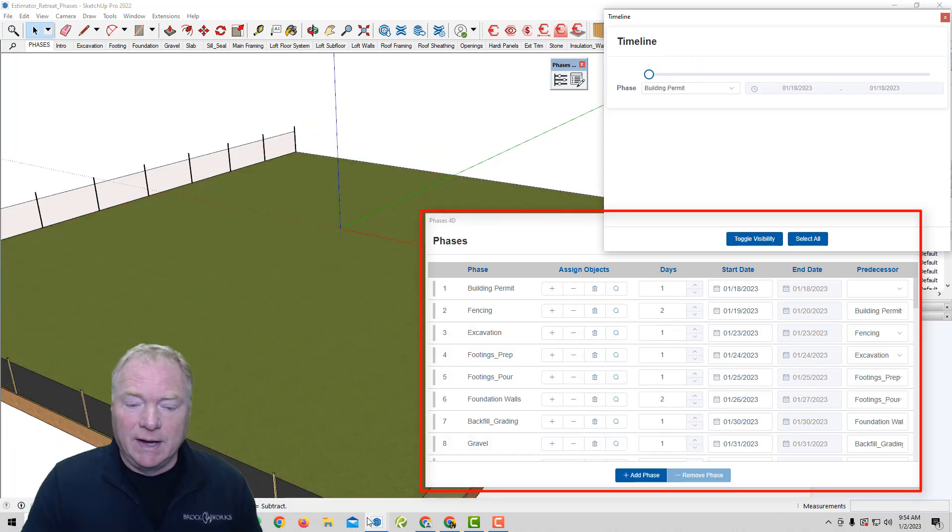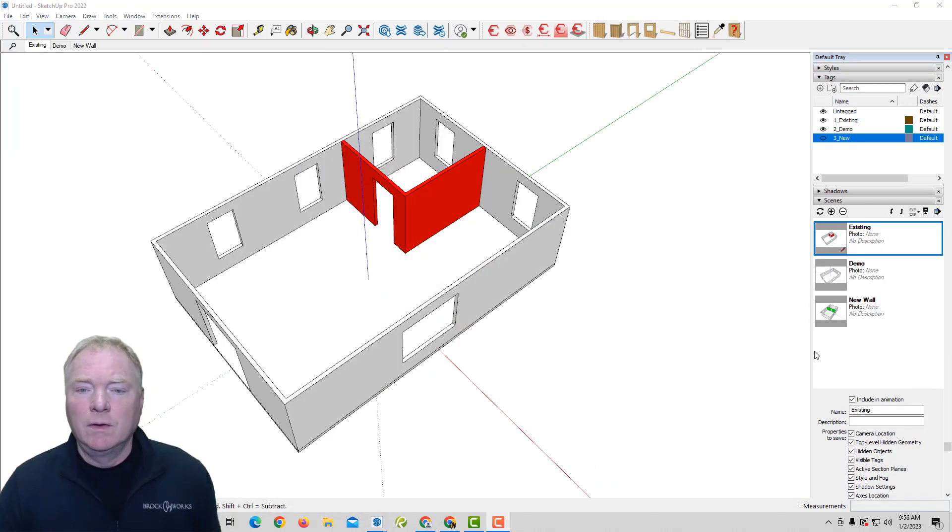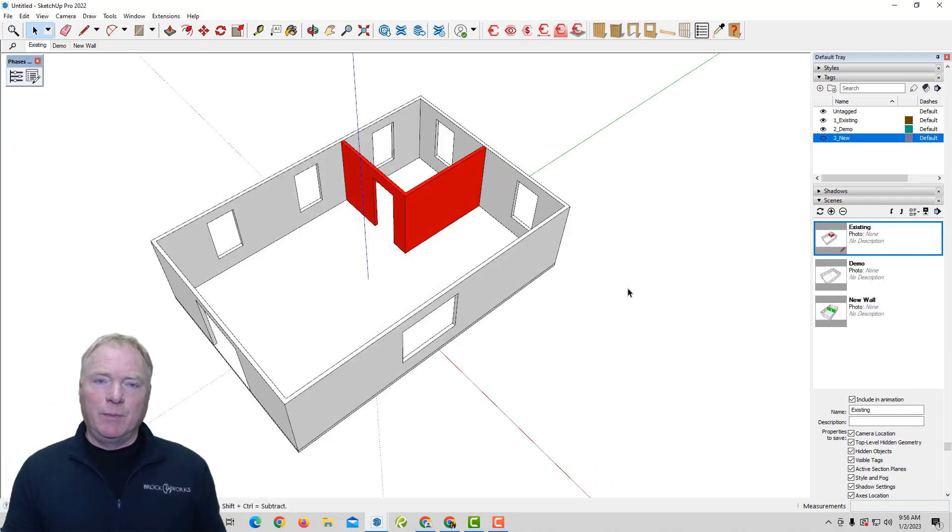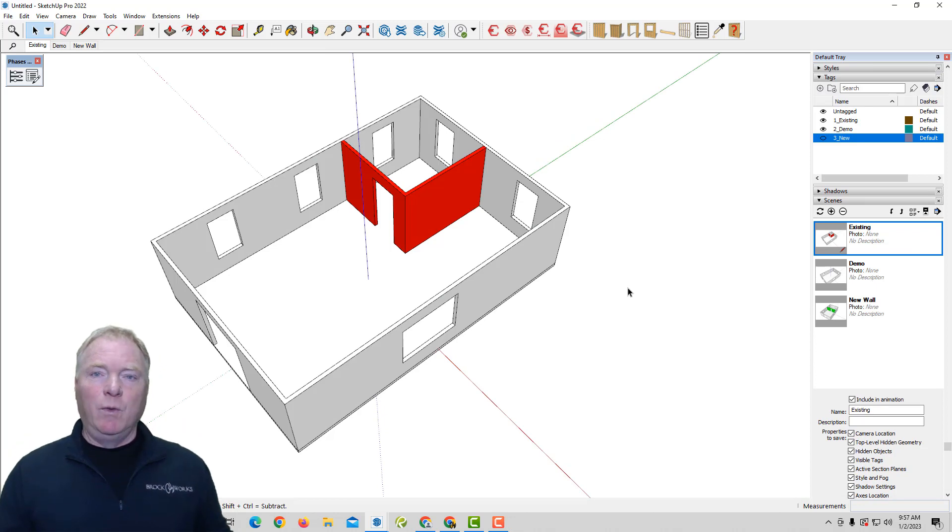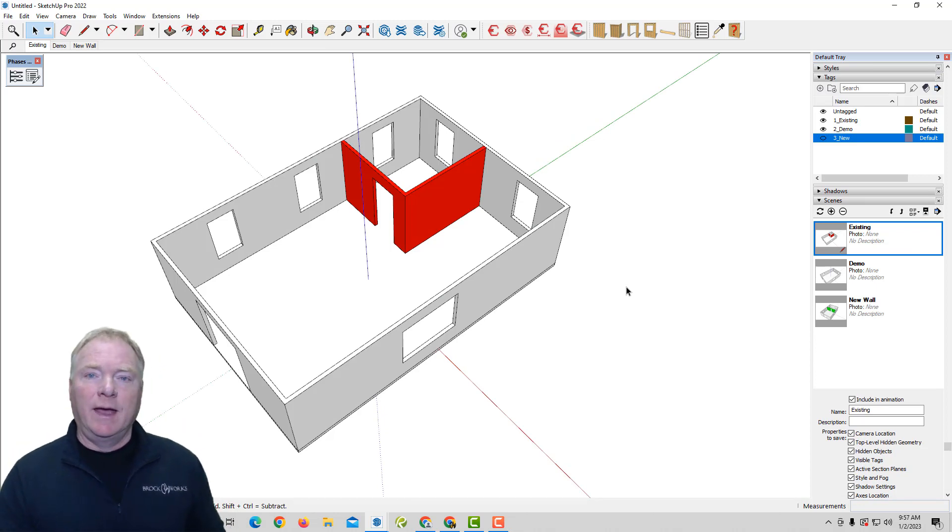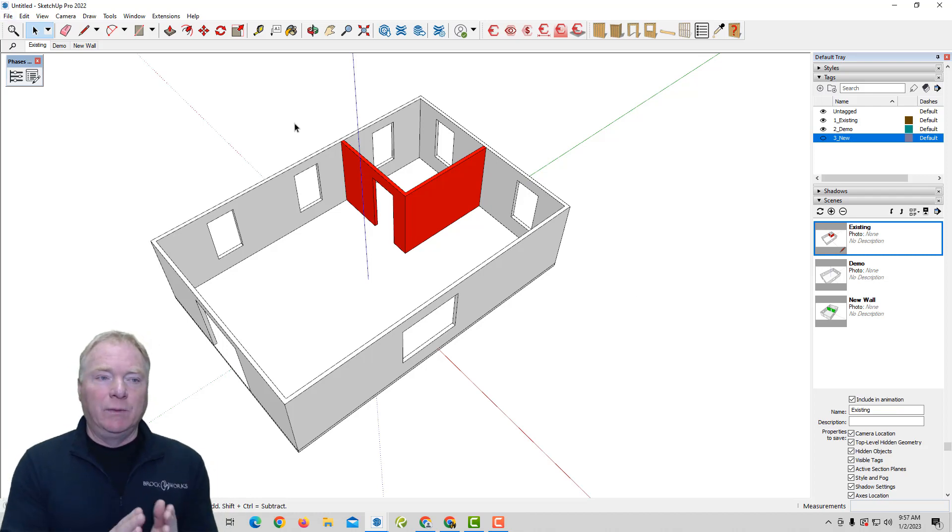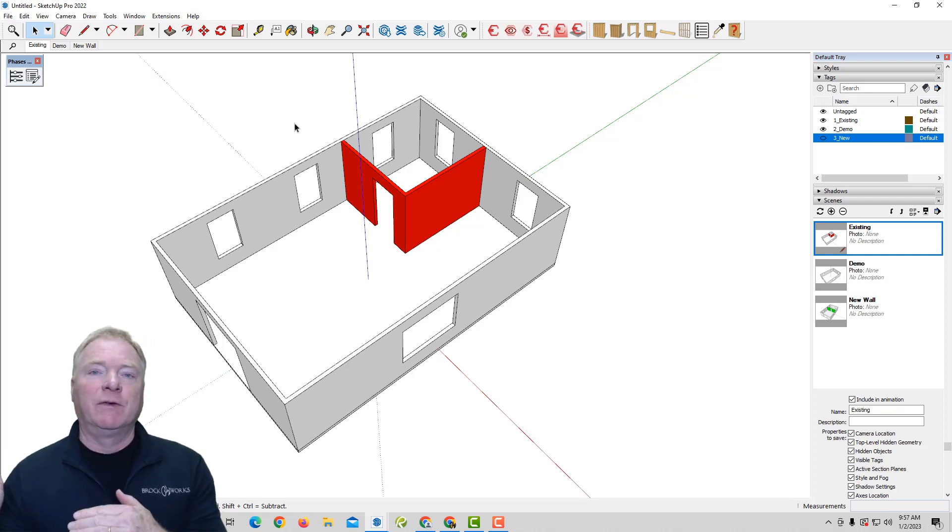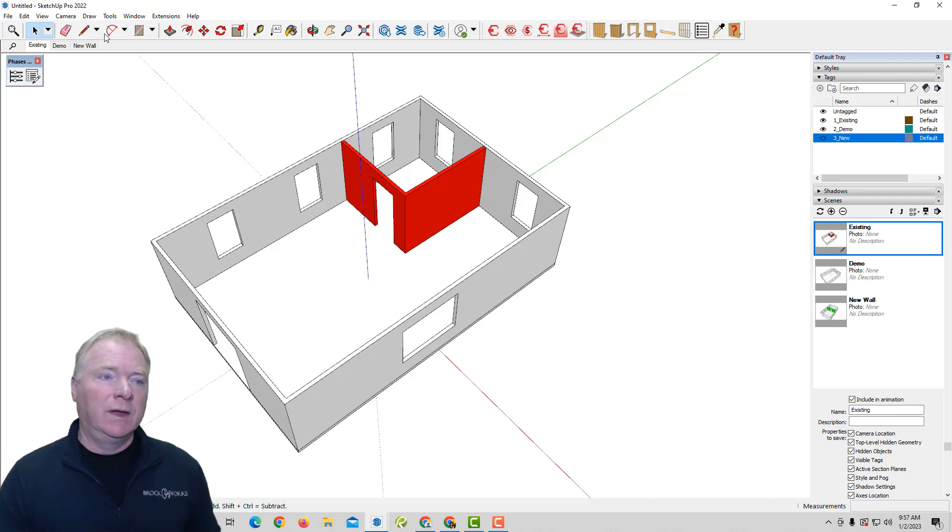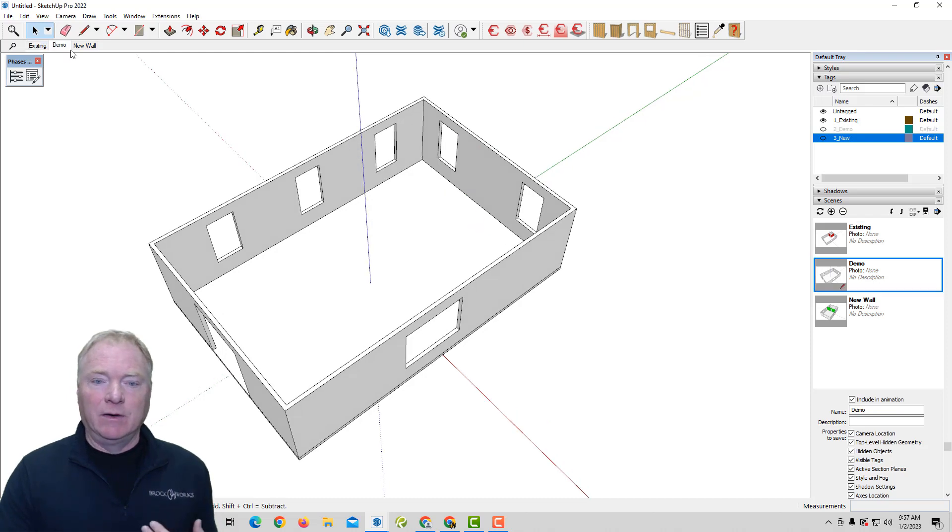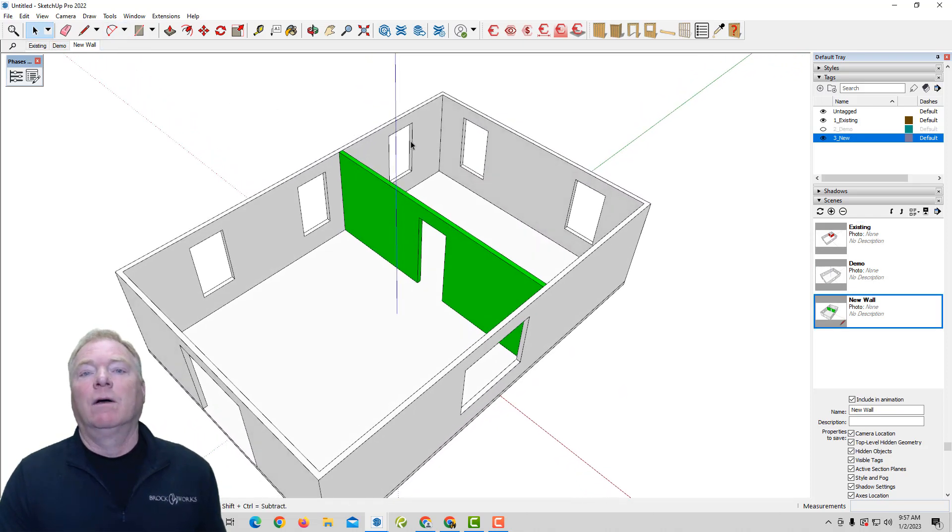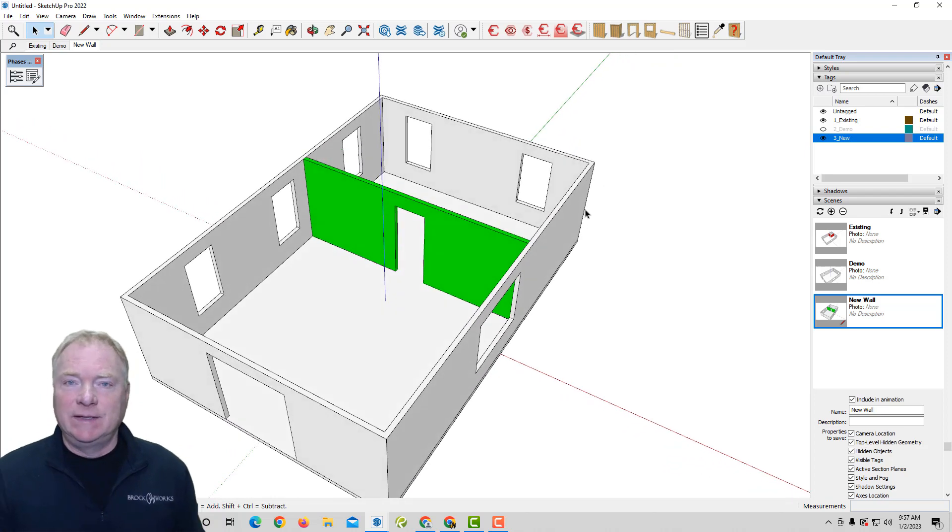And so we'll break it down into a more simple example. So let's take a look at this example of a simple house, for example, that we're going to demolish the walls that are red. And we're going to add a new wall in this project. So in the way we typically do it is have different tags. So we have existing, we have demo, we have new walls. And I would create scenes. So we have that's the existing, then our demo, we're removing those walls, and then a new wall. And it'll be done in scenes.